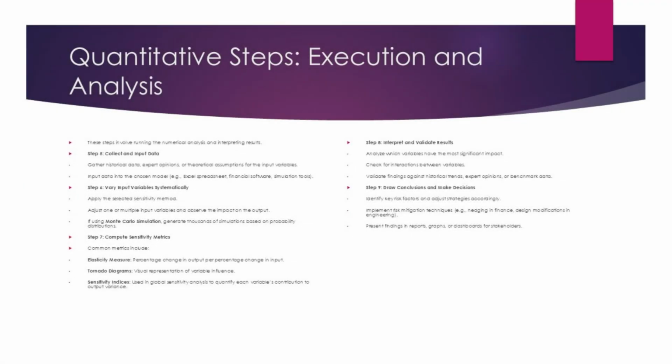Quantitative steps in sensitivity analysis involve the collection of data, running of simulations, and analysis of numerical results to assess how changes in input variables affect outcomes. The process starts with historical data collection or expert estimates that can be applied to a model. This requires strategically varying different values based on methods like Monte Carlo simulations, regression analysis, or scenario testing.